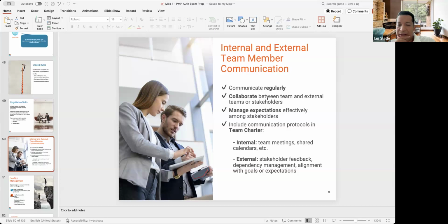And the more you communicate, the more frequent, the better. And you want to adjust it, going back to our RACI matrix, right? If they're intimately involved in the project, you're communicating all the time. If they're more on the periphery but want to know how it's going, then you communicate maybe on a monthly basis. And if they're indirectly and they're just affected during go live, then you make sure you communicate then.